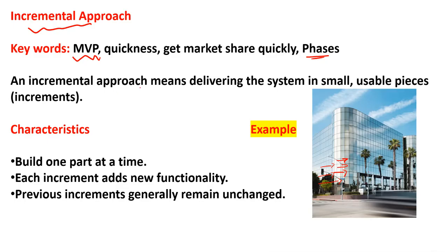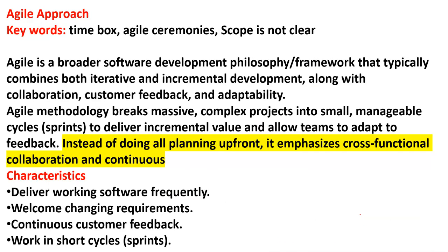An incremental approach means delivering the system in small usable pieces, increments. What are the characteristics? Build one part at a time. Here you do not have to hand over the building as a single unit to the customer. You have to hand over one by one, first floor, second floor, third floor, and so on. Each increment adds new functionality. Previous increments generally remain unchanged.